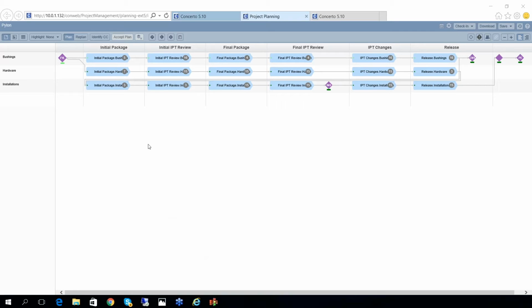And if I look at the number of people working on this project, so this is a real life project that we took, it has about 20 engineers working over 6 months on different details inside the project. Originally, before we implemented critical chain, they were trying to manage this project using about 400 tasks. When we implemented critical chain, we brought the number of tasks down to about 75. But with this 2-tier concept, now this project plan can be simplified into about 3 times 6, about 18 tasks.